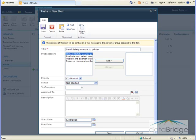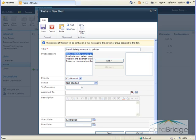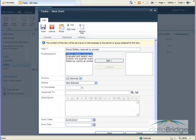For Percent Complete, I will leave this blank since this is not started. The person assigned this task can update this once they begin working on this task by entering a percentage that best represents how much work is completed, and when the task is completed, they can change it to 100%.